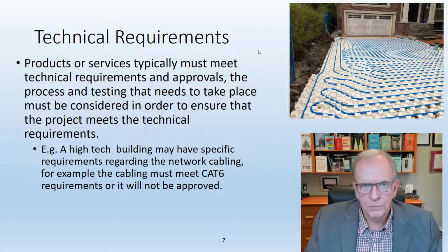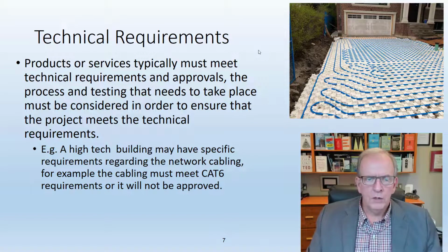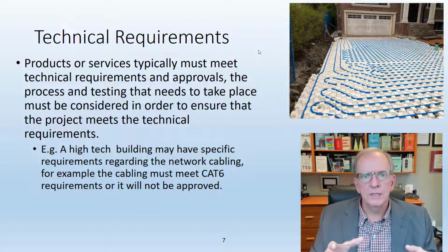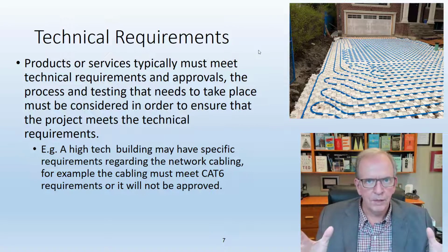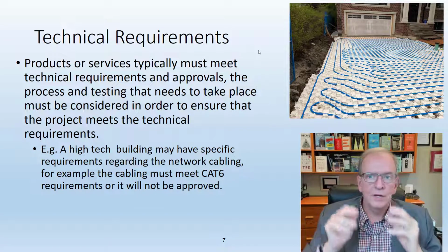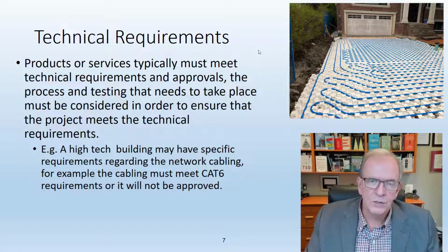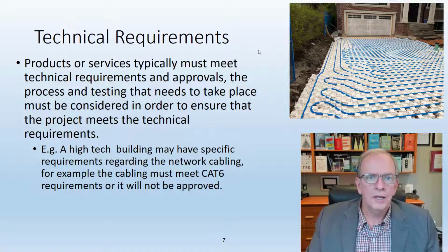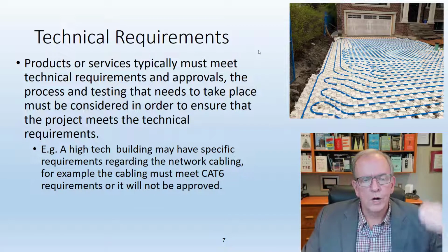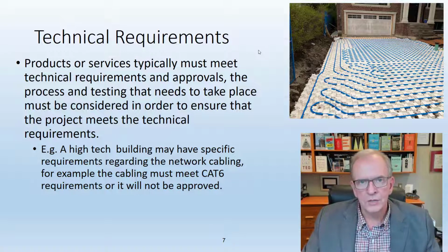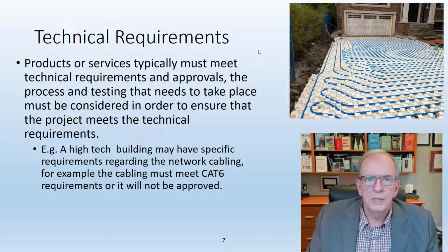This could tie to the Pareto principle, where you identify 20% of the elements that you think are really technically complex for you. Maybe you've never done a hydronic heating system, right? And this is new to you. So maybe that's going to be one of the ones that you want to highlight as a technical requirement that's going to require extra focus and extra effort for you to be able to be successful on it.